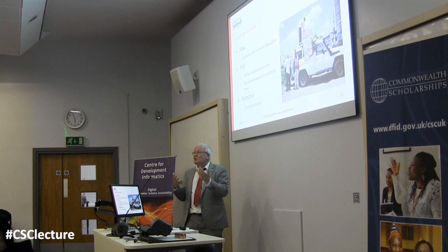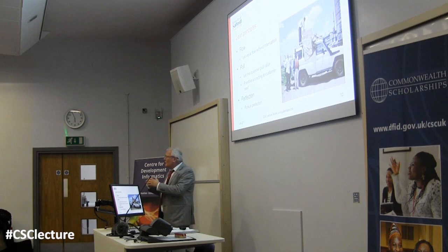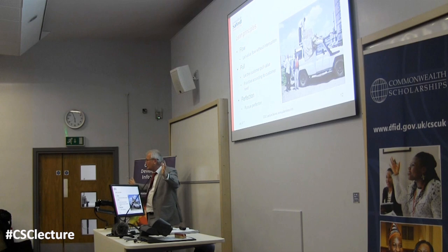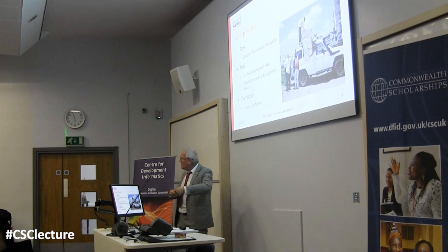But it's a really good aspiration to say, rather than imagining that I'm going to roll out an inoculation program to a whole region of the country, think about how I can roll it out in one small area, and then how can I replicate that in other areas, improving quality and improving efficiency each time I do it.